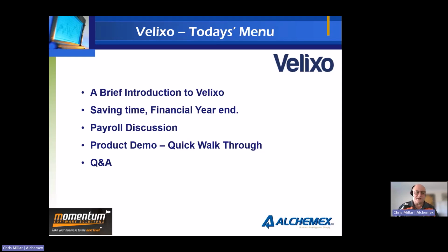So where Velixo comes in, they were finishing a quote, and then somebody is building the project, adding the tasks, adding the budgets, and then doing the purchase orders. That took 2 to 3 days, and maybe a day of fixing and checking to make sure it's all right before it's approved. Now what they do, they finish that quote, it's approved, hit a button, and Velixo just builds that all in 2 minutes.